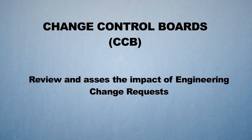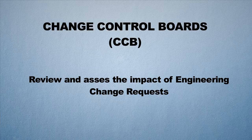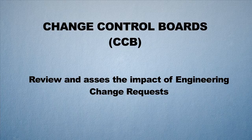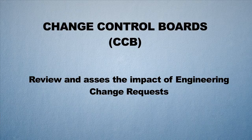This process of configuration control — where there's only one baseline set of requirements and any changes must go through a formal process — ensures that at any decision point, all analysis and studies have been done to thoroughly think through the impact of a change before it's agreed to.